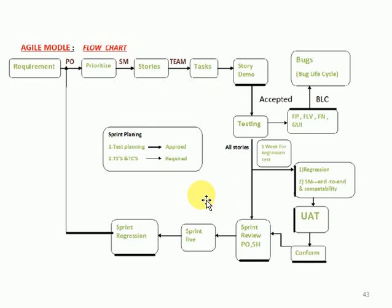Testers retest; if there are no issues, the story is clear. Before testing begins, the development team gives the story demo — the ONM — and testing only proceeds if the story is accepted. After testing, the UAT team performs their testing. Once UAT is fine, a demo is given to stakeholders and the product owner; if they approve, the sprint code goes live. At the end, the sprint retrospection meeting covers what went well, what went wrong, and lessons learned — completing the full Agile process flow.